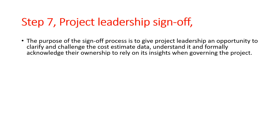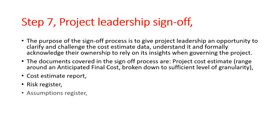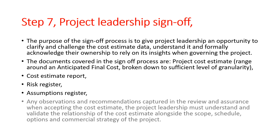Step 7: Project Leadership Sign-off. The purpose of the sign-off process is to give project leadership an opportunity to clarify and challenge the cost estimate data, understand it, and formally acknowledge their ownership to rely on its insights when governing the project. The documents covered in the sign-off process are: Project Cost Estimate, Cost Estimate Report, Risk Register, Assumptions Register, and any observations and recommendations captured in the review and assurance. When accepting the cost estimate, the project leadership must understand and validate the relationship of the cost estimate alongside the scope, schedule, options, and commercial strategy of the project.